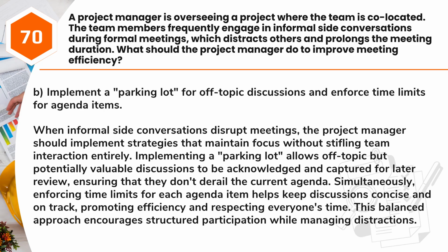Answer: B. Implement a parking lot for off-topic discussions and enforce time limits for agenda items. When informal side conversations disrupt meetings, the project manager should implement strategies that maintain focus without stifling team interaction entirely. Implementing a parking lot allows off-topic but potentially valuable discussions to be acknowledged and captured for later review, ensuring that they don't derail the current agenda. Simultaneously, enforcing time limits for each agenda item helps keep discussions concise and on track, promoting efficiency and respecting everyone's time. This balanced approach encourages structured participation while managing distractions.